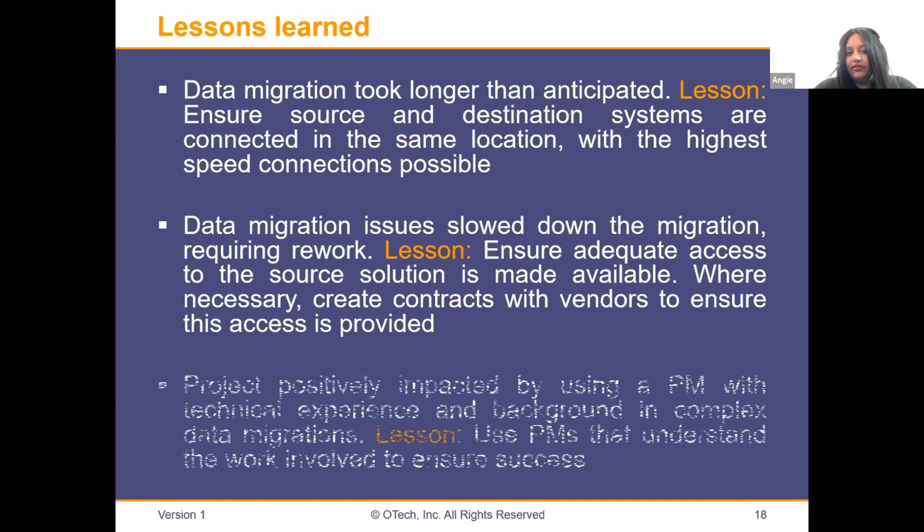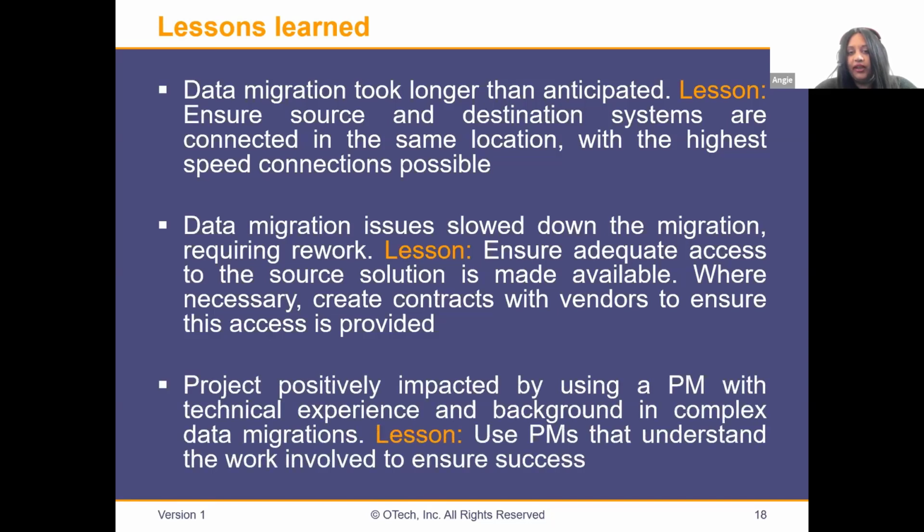Use escalations with vendors when they're not delivering early on. And even, as a last resort, use penalties within contracts or POs or statements of work if you can, as a mechanism to influence vendors, particularly in the case where one vendor that you're migrating from is coming out of the picture. Some of these types of measures are very key.